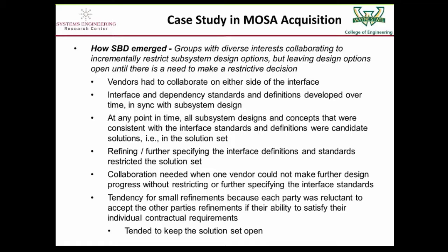But in this case, this set up a framework that incentivized the vendors to fall into a set-based design solution approach. We would note that the realization of this tended to be, on this program and on others that have done something similar, that the interface and dependency standards are refined in very small incremental steps, which means you end up holding back the design process.